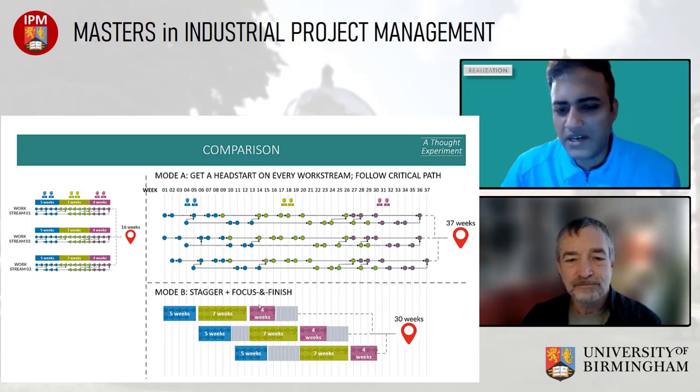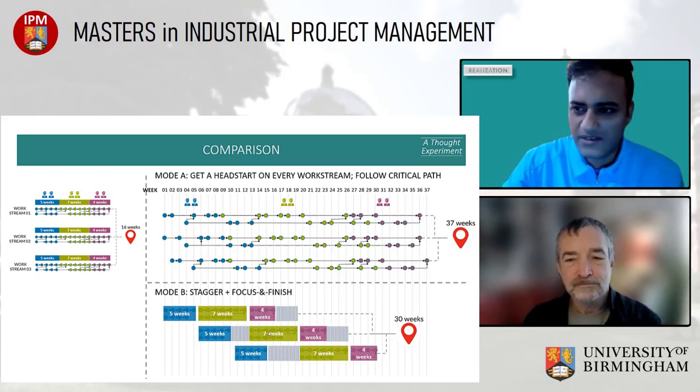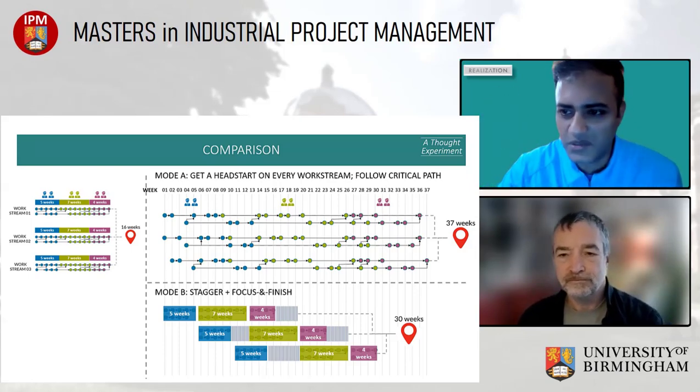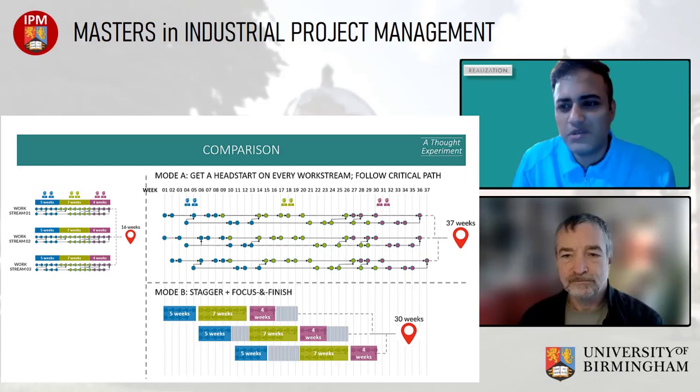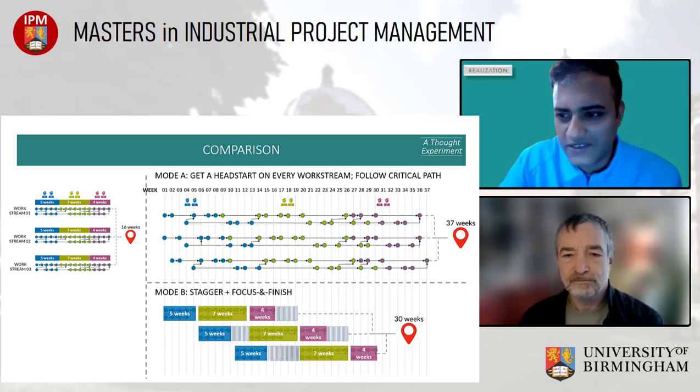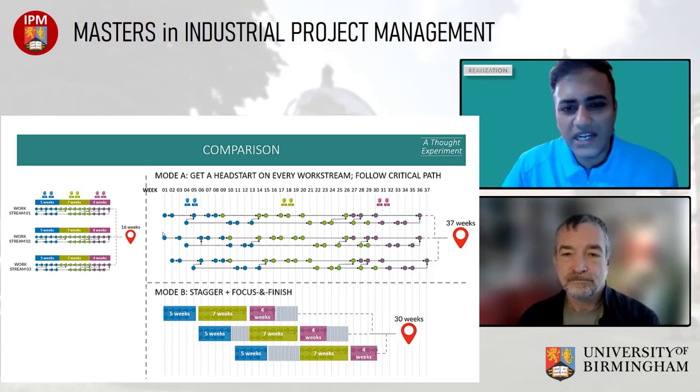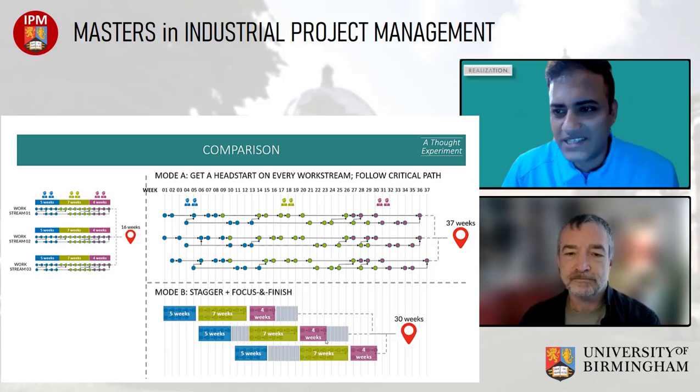Which means that if we have to do this, we need to build the network at the batch level. But when work is getting allocated, the priorities that are being driven by this batch level have to also flow to the dots, and people should be able to see dots when they're doing the work. Now, if we try to do that in traditional tools, if we define the dots, the network immediately goes to this level, which we discussed last time. And if we only define the batches, then people can't see the dots. So that is the problem.